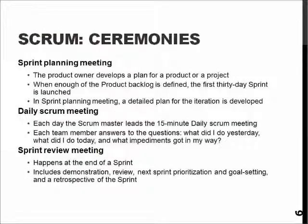The ceremonies are more or less just new names for different things in other models. The sprint planning meeting is a meeting where the product owner develops a plan for the project to happen, usually done for each iteration, because 30 days is a relatively long period of time if you don't know what you are doing. The daily Scrum meeting is just 15 minutes so that everyone knows what other people are doing, and the review meeting shows us where we are now and what we have to do next to stay on the overall course of the entire product development.